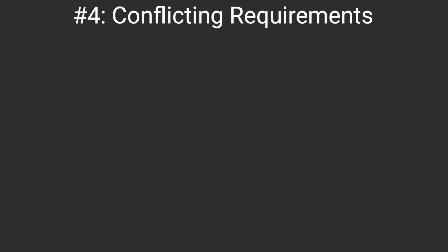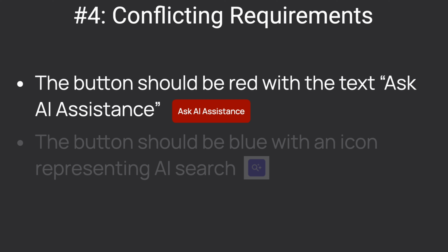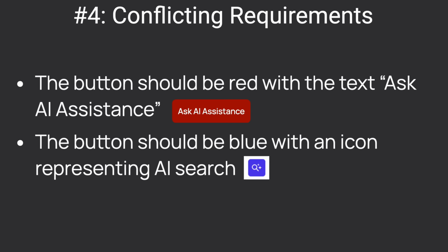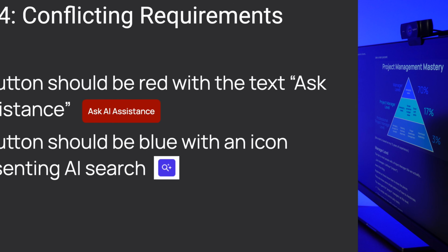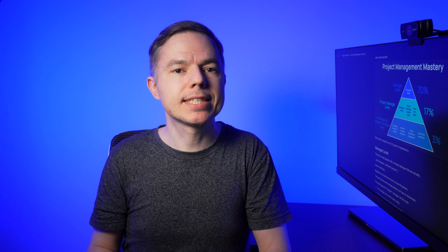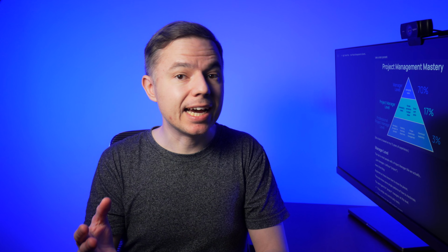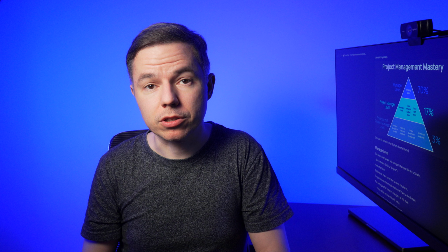Next, you can imagine conflicting requirements that come from different stakeholders. Well, first of all, RTM allows you to identify those conflicts. Second, you can't please all the stakeholders, but you may decide to follow the one who has the biggest impact on the project. So you can see here who requested the requirement, and you can cross-reference your stakeholder management plan.